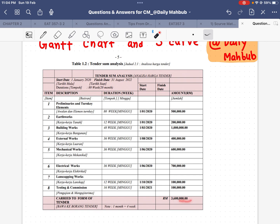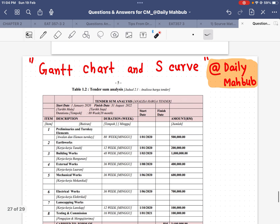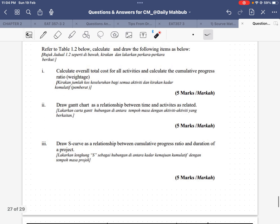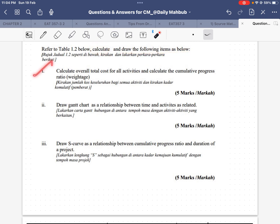We also have the amounts. For preliminaries and turnkey elements we have 500K, and the total is 3,600,000 Malaysian Ringgit. From here we can see the questions: we have to calculate and draw the following — first, calculate the overall total cost for all activities.